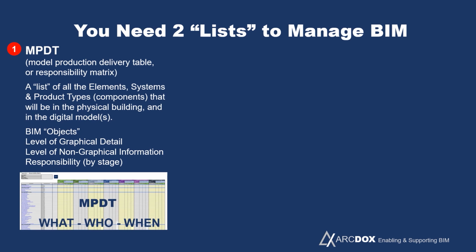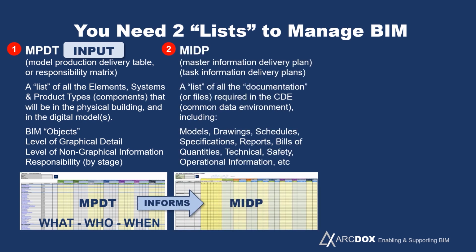So typically the designers would be responsible for those during the design stage, from stages 1 to 4, and then the contractors and subcontractors would be responsible from stages 5 and 6 up to handover. So that's one list, and I like to think of it like an input list, like what are we going to put into this model or this building.